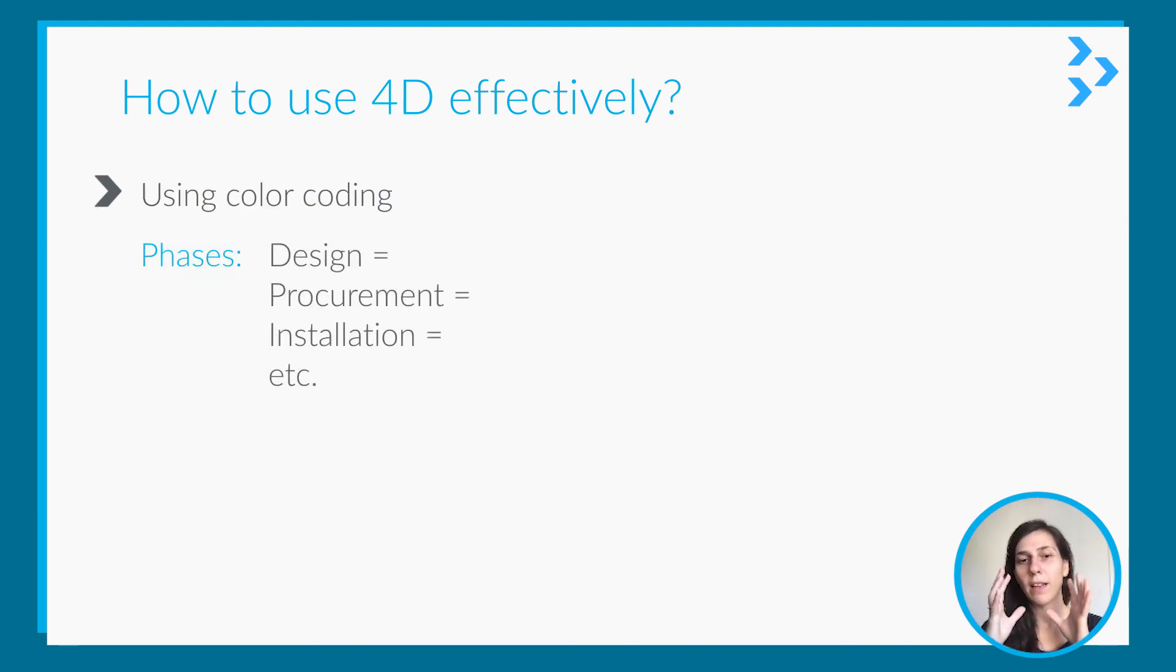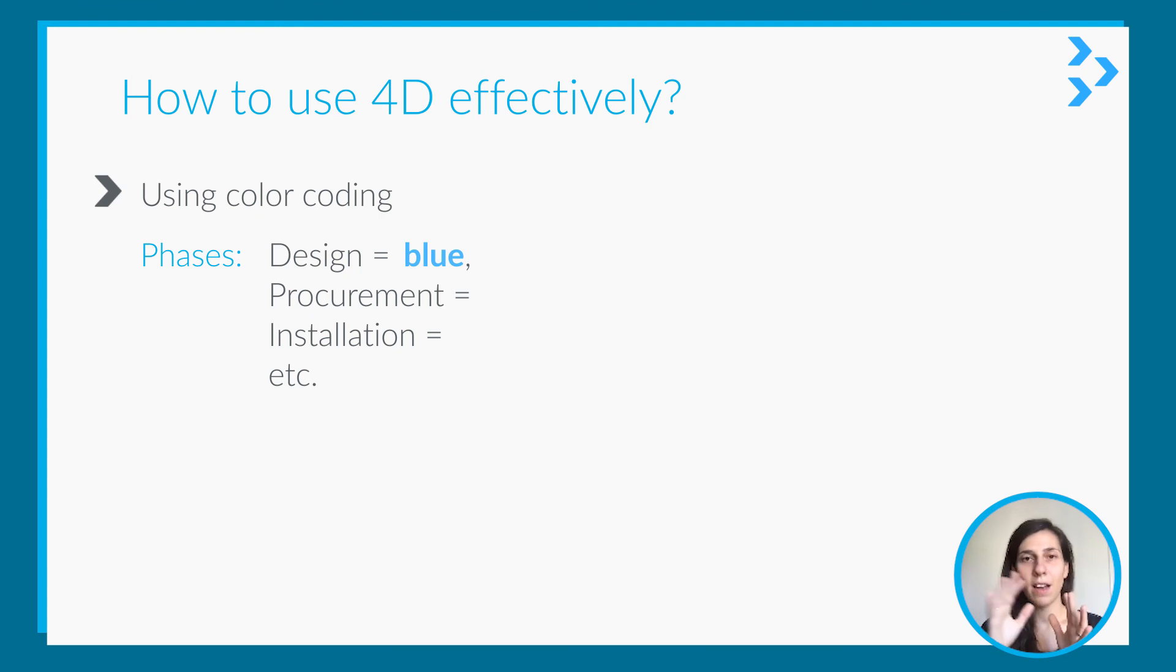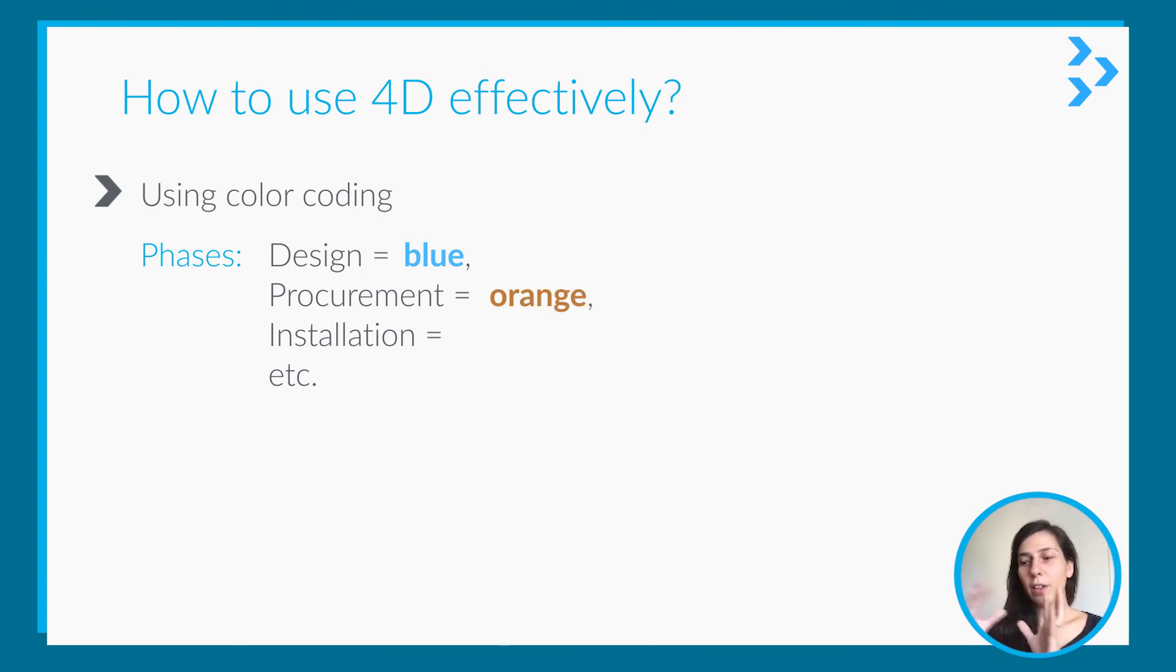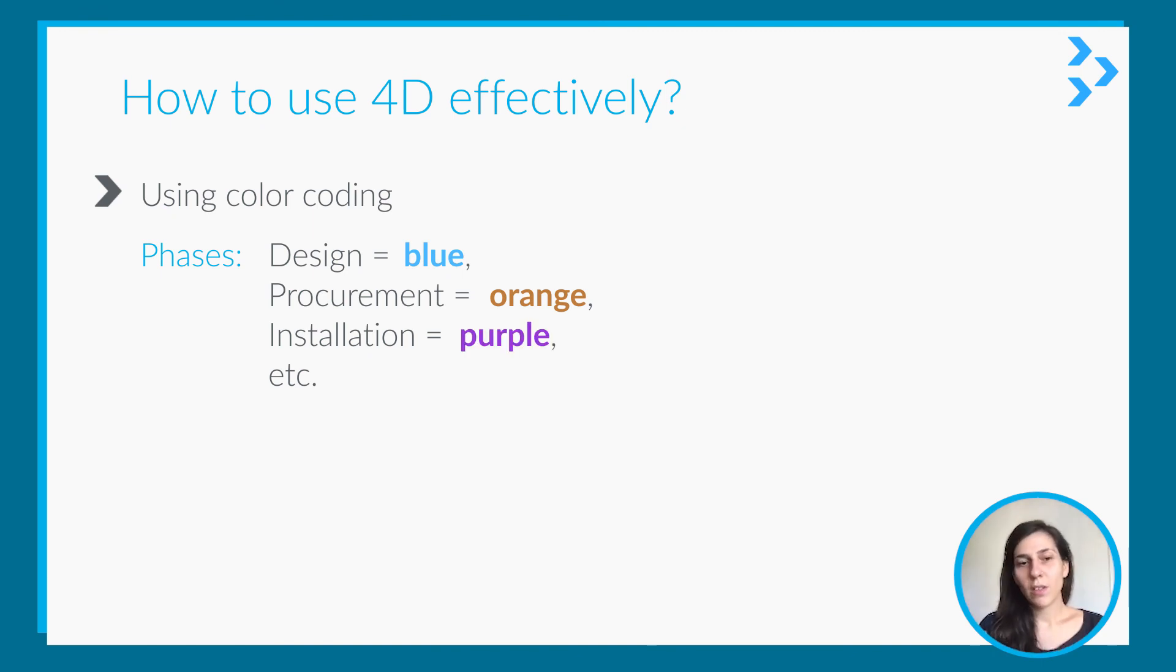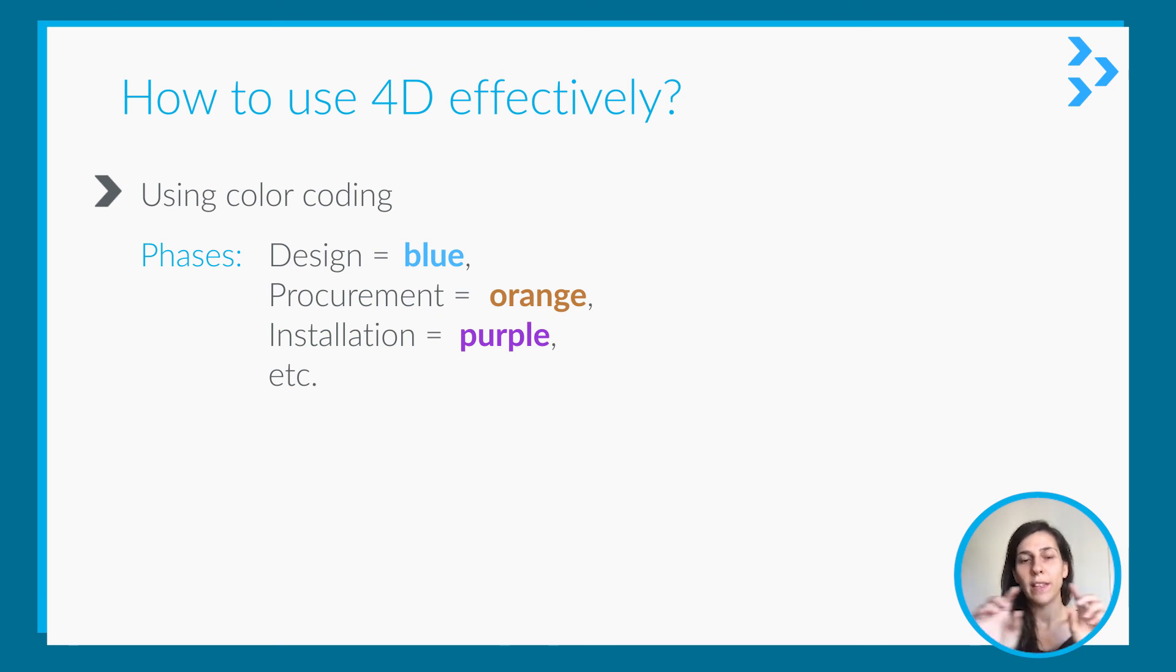You can put different colors for design. For example, you can say the blue ones are in the design phases currently, the orange ones are currently in procurement, and the purple ones are already installed on site. So it is really easy to understand with the color coding.